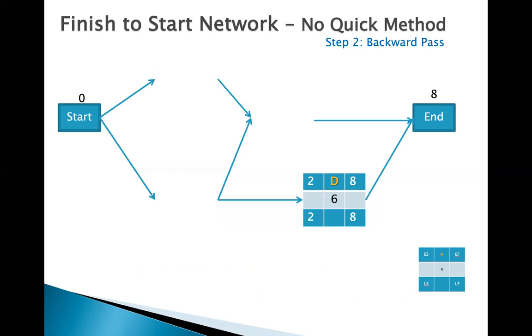So what is the late finish? Remember, we're calculating the late schedule on the bottom line of each activity. So now we have to calculate the late finish of activity D, which is 8. Just copy and paste the early start of the activity end, the same way we can do building the late finish of activity B. So it's the same, just 8.